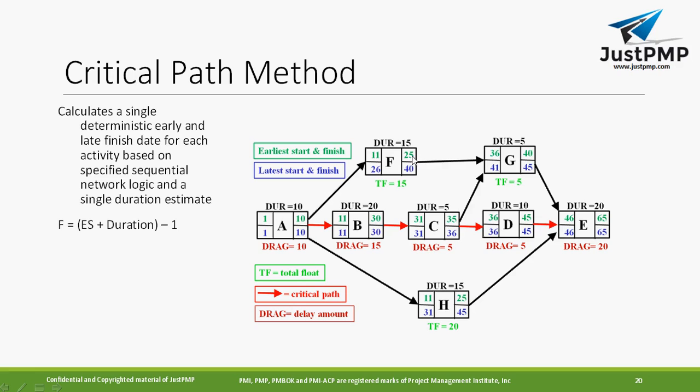When you're creating your critical path diagram and starting G, even if you completed 25 days, C is also linked to G, so I have to wait for a few days, right? This one will complete on the 35th.